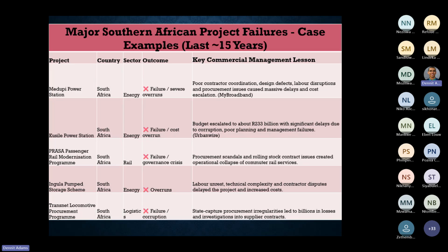Medupi Power Station, in the energy sector, was considered a failure because of severe overruns. The key commercial management lesson here is poor contractor coordination, design defects, labor disruptions, and procurement issues cause massive delays and cost escalation. The brackets are just my reference for where I got the link to the articles or the information.